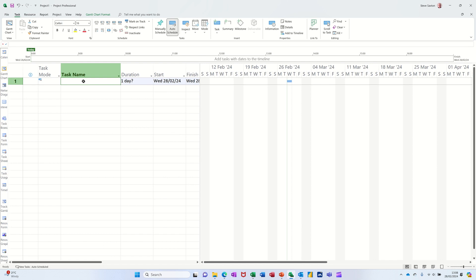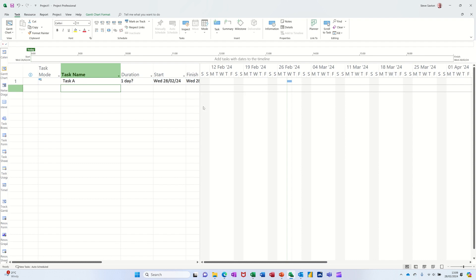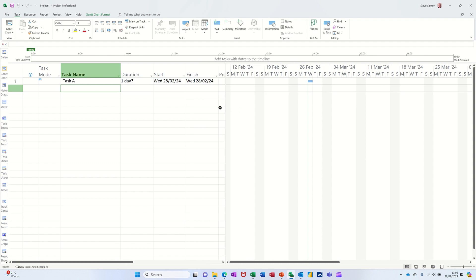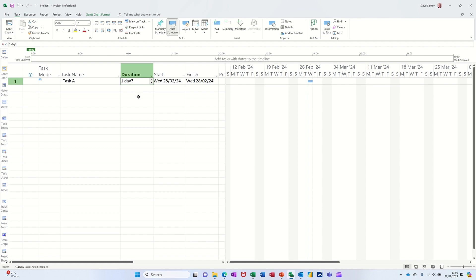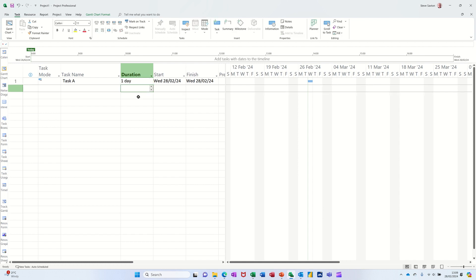Now basically you start off by typing your tasks. So if I go task A, for example, it automatically — when you've got it set to auto-scheduled — gives you a start and finish date based on today's date. Duration says one day with a question mark. Question mark means it's an estimated time, so if you just type one and press enter it will go to a one day duration.